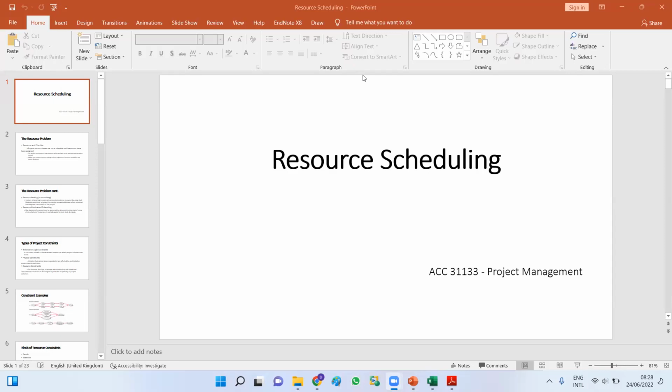Therefore, in that case, you have to calculate the expected time for each of these activities, and after calculating the expected time, you get one duration for each activity. Then you can continue the calculations the same as we have done for the project network, right?